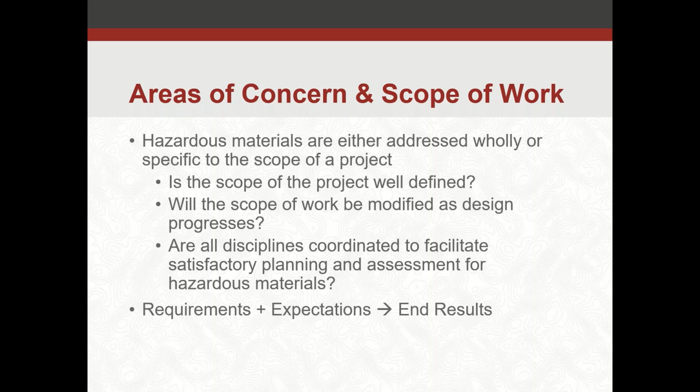Some other things: we want to know, is the scope of the project well defined? That's a critical point. A lot of times through the design phase, things are still progressing and you're still developing that scope. So when you're doing a survey assessment, you may not have all the pieces of the puzzle yet. You may have to look at different options, such as a phased approach to the survey and assessment, or do the best you can at the front end, knowing that there's going to be another survey assessment to complete as that scope might change during the design process.